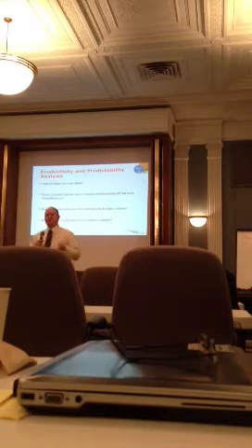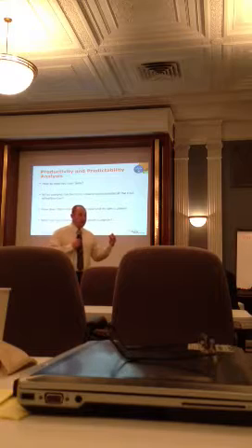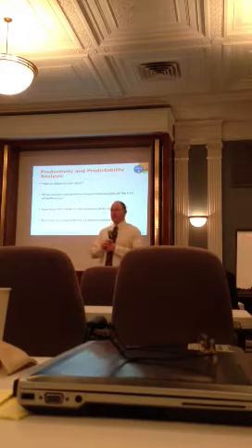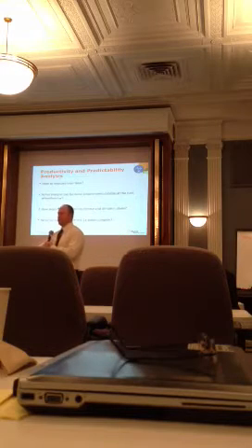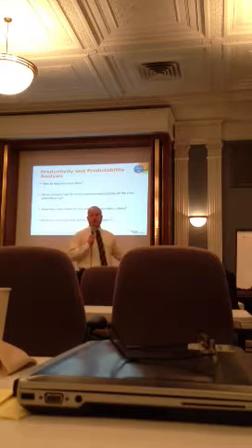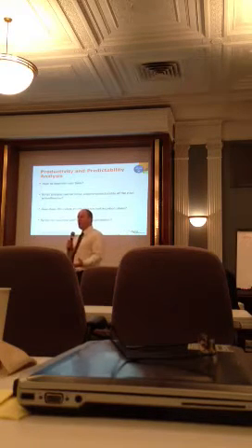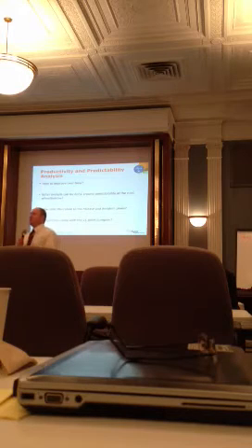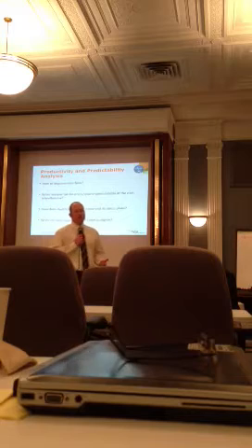That same thought process, that metaphor, translates very well to an Agile world. One of the knee-jerk reactions of our leadership is, oh, you're running behind, I'm going to give you a bunch more work, here's a bunch more people, right? That's very similar to the larger wheelbarrow. They dump in a bunch of new people that you're not familiar with. You're going to move slower. You're going to start tripping over each other. You might be duplicating work and not realize it because you're not aware of what everybody else is doing.